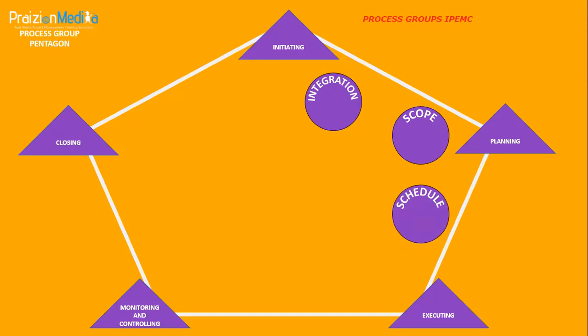And this is where we create the schedule. We create the schedule by breaking down the larger chunks of scope into activities and then sequencing those to get a schedule. The next thing we think about could be cost. And this is where you cost out all of those schedule items. You come out with a budget, you manage that project to the budget.